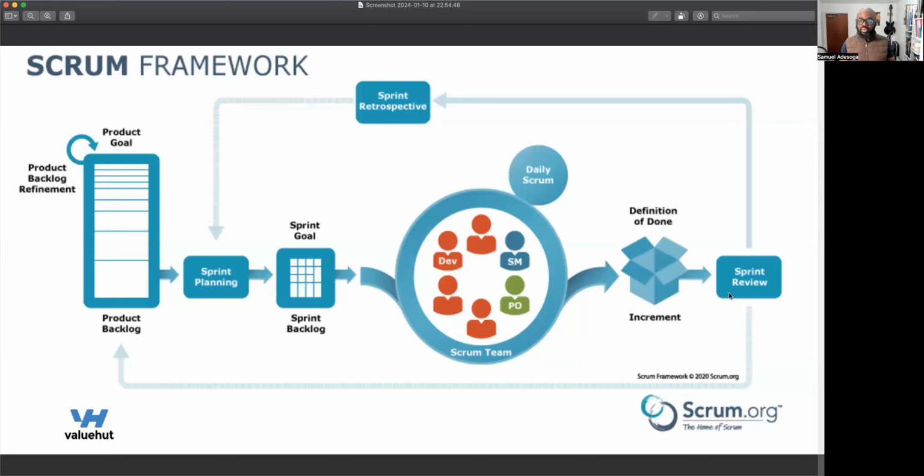It's meant to be a meeting where the increment is inspected, the business conditions, budgets, progress towards the product goal could be discussed in there. And ultimately, one outcome you want to get from the sprint review is to adapt the product backlog. Are there any updates that are mandated, a deletion from the product backlog, adding more items to the backlog, or refining the items in the backlog? That's really the key output from the sprint review, and that's in preparation for the next sprint planning.